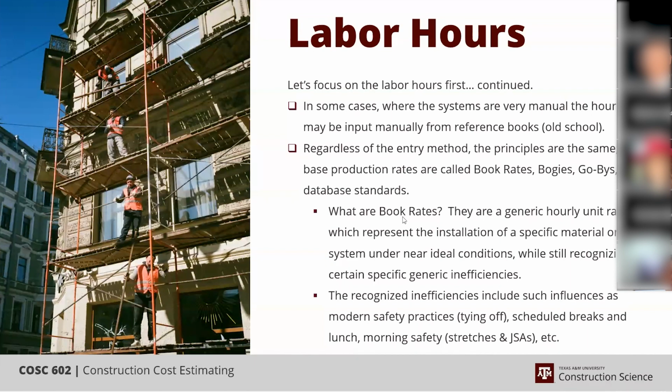In a couple of areas, the changes actually don't hardly matter. Even though we now do a lot of welding automatically, using automated machines to weld instead of hand welding, the time that it requires to set the machine up burns up the amount of time saved by the machine. And so the actual welding time is almost the same. But we still primarily weld by hand, whether it's a rig welder or a single hand welder using a welding machine that's been provided by the company.